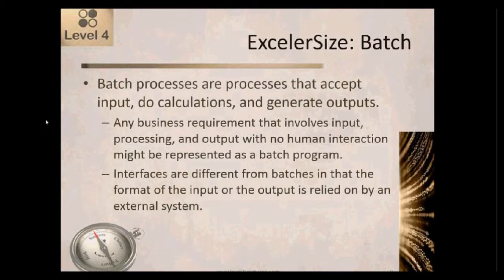Batch processes are processes that accept input, they do some kind of calculations or some manipulation of the data, and then they generate an output. So any business requirement that you see that involves input, some kind of processing and output with no human interaction may be represented as a batch program in terms of sizing. So it's a fairly broad sizing category.